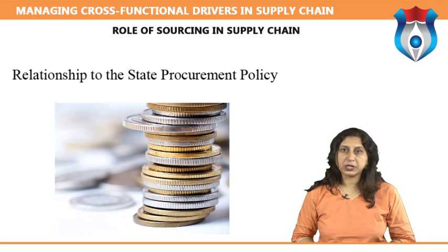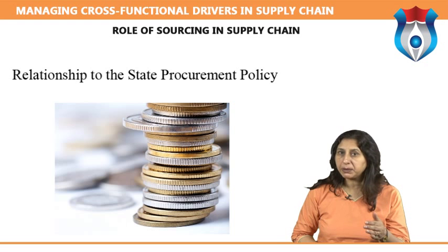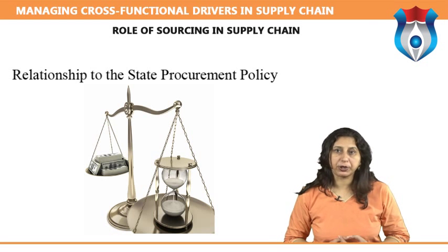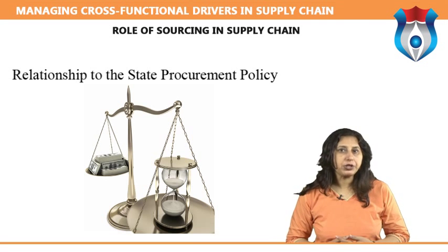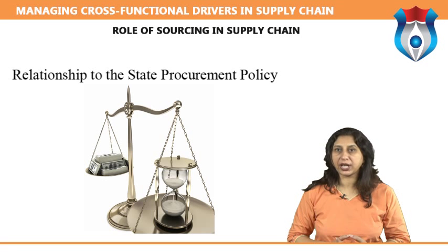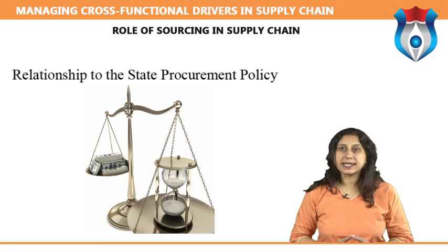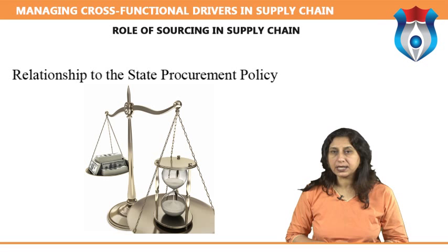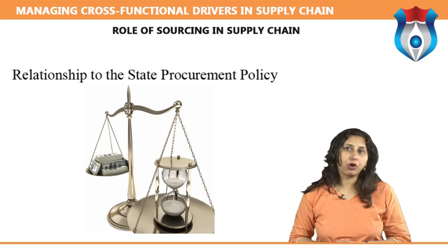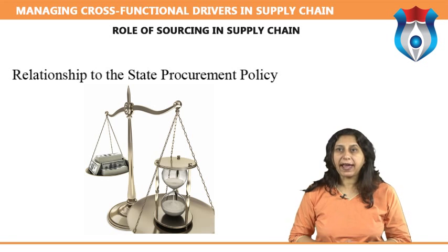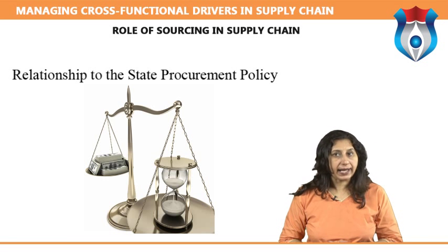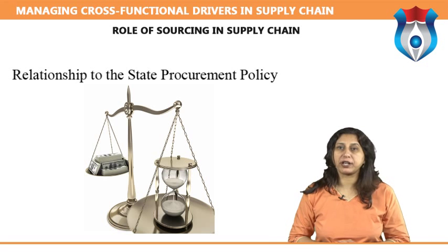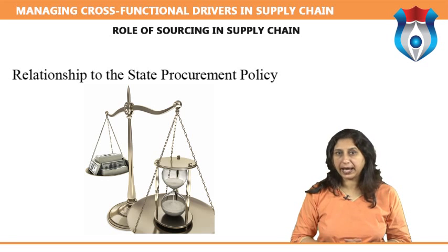The state procurement policy mandates that as a minimum, significant procurement plans must establish the objectives of the procurement, specify how the procurement supports the achievement of agency procurement objectives, establish the status of the supply market relevant to the area of procurement and the likely impact the procurement will have on the market, evaluate potential buying strategies and identify the preferred strategy to be followed. Specify measures for evaluation of the implementation of the supply strategy.